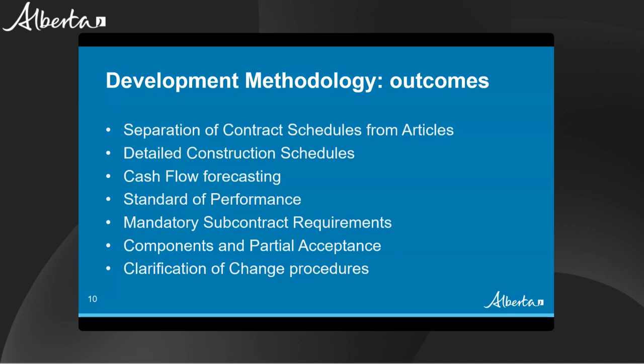The mandatory subcontract requirements also prohibit certain subcontract terms that would undermine prompt payment initiatives, such as those that prevent access to statutory protection or insurance, or those that install pay-when-paid payment schemes. The intent of these requirements is to help ensure the long-term stability and viability of skilled labor and trades in Alberta. And for those of you that have been working with us on the prompt payment legislation, our hope is that our contracts will be fully aligned with whatever legislation we may or may not be receiving for prompt payment on government projects.